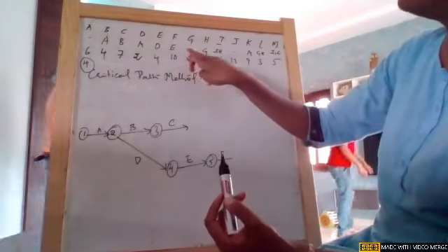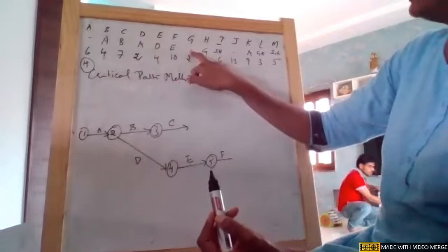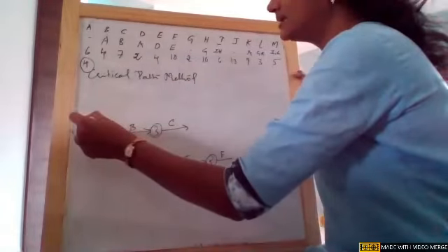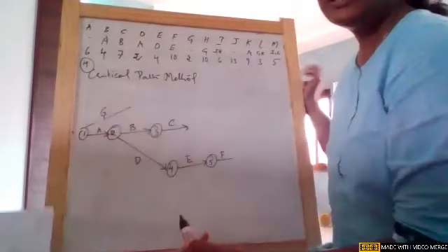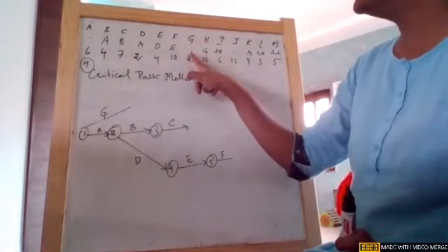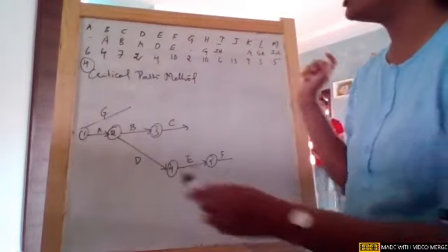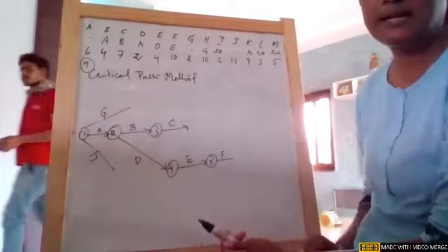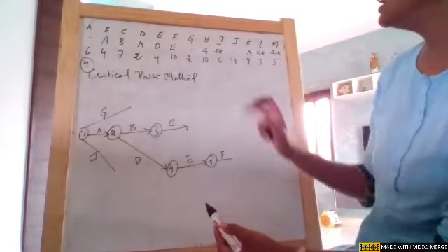And there is also one more activity without any predecessor. Okay, so that is simple. I can take this as G. That means it is also starting from the initial position only. If you see, girls, G is not having any predecessor and J is also not having any predecessor. Simple, they're all starting from node 1. Blindly, you can take it that way.